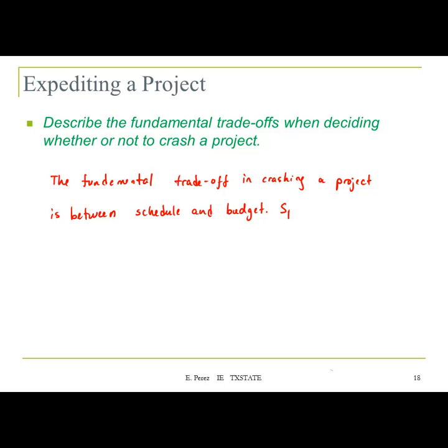So specifically, crashing entails employing additional resources, which is related to your cost, in order to reduce the project completion time.